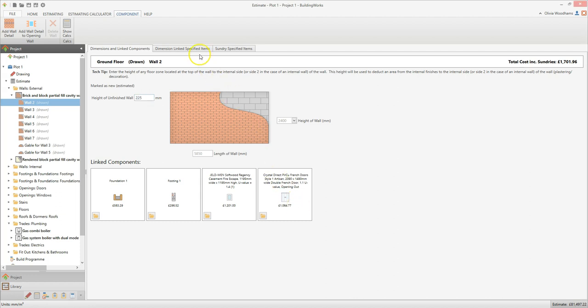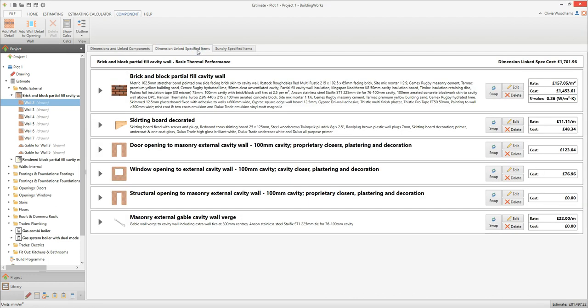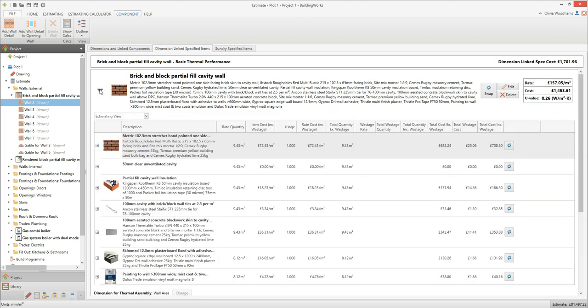Click on the dimension linked specified items tab of the wall and open up the brick and block partial fill assembly. If you wanted to change the brick for a different size — for example to use imperial rather than metric bricks — you would need to change the brickwork rate, as the labour calculations and mortar quantities would also need to change. However, if you only want to change the brick finish, you can simply swap the brick resource. Click on the plus button next to the brickwork rate to find the brick resource, then click on the swap button adjacent to the brick.